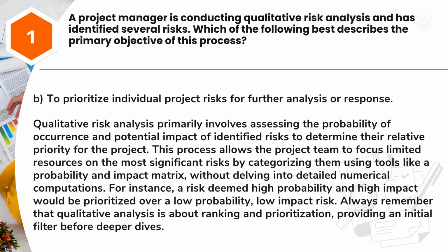For instance, a risk deemed high probability and high impact would be prioritized over a low probability, low impact risk. Always remember that qualitative analysis is about ranking and prioritization, providing an initial filter before deeper dives.